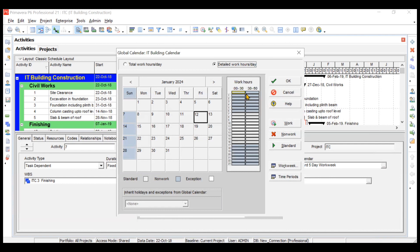Now check the detailed work hours. The default shows the site starting at 7 AM running till 4 PM, but that's not our case. We need a lunch break from 1 PM to 2 PM, and the site starts at 8 AM. Mark the 7 AM slot as non-work, so work runs from 8 AM to 12 PM, then 1 PM to 2 PM is a break.